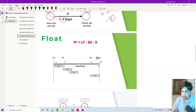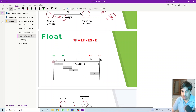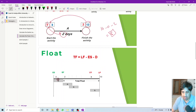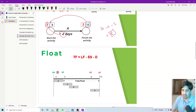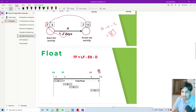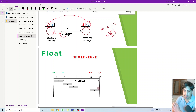To illustrate what we mean by float: activity A needs two days. The early start and early finish represent the earliest timing; late start and late finish represent the latest. Activity A can start at day zero, needs only two days, so it finishes early at day two — that's the earliest finish. The latest finish is day 10; the activity must not exceed this boundary.